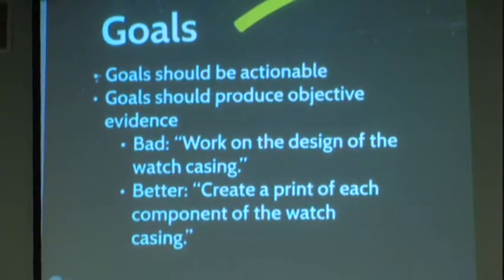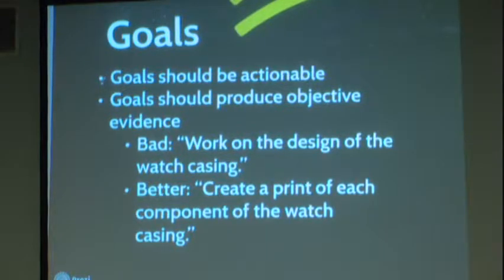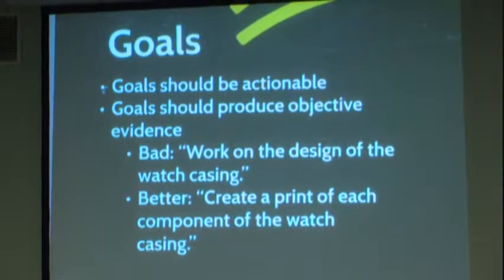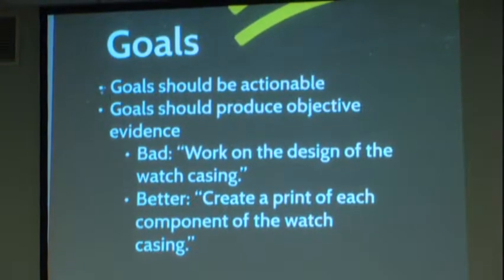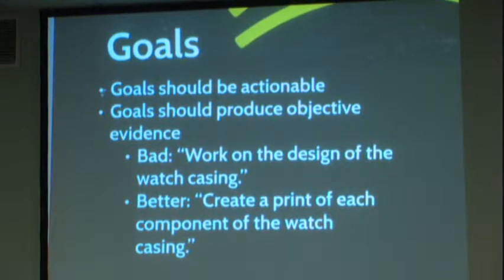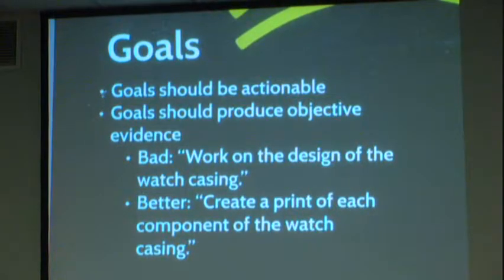So if you have a goal for a week, it should never be something that is always true, okay? So if your project is to work on a museum exhibit, your goal should never be, I'm going to work on the museum exhibit, or I'm going to design the museum exhibit. That's always true. You guys are always doing that. So it should be, I am creating a schematic for the handle of something that goes on the, right?